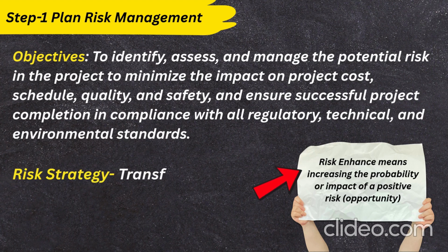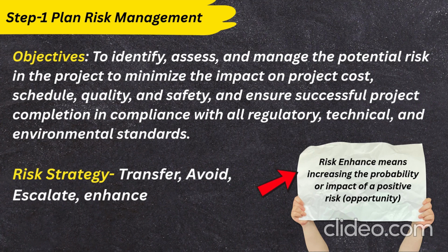The next strategy which we will be using in this project is enhance. Risk enhance means increasing the probability or impact of a positive risk opportunity. For example, adding extra skilled developers to finish the project early and gain the bonus.